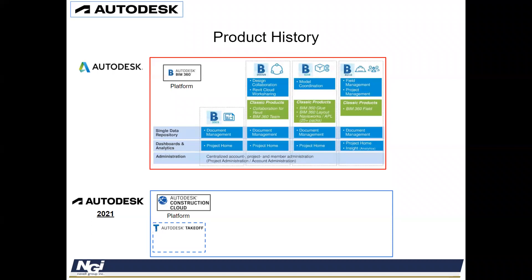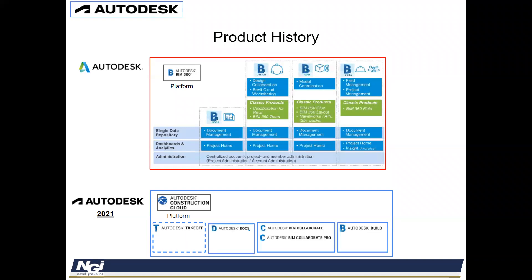They do have another software that is part of the cloud, which is Autodesk Takeoff. This software is not part of our current subscription package, but it's similar to OST, it allows you to do quantitative takeoffs, you can measure A-type walls, B-type walls, and it would give you footages. This is the current suite that's available, and I put a dashed line around Takeoff that's available if we wanted to look at it.